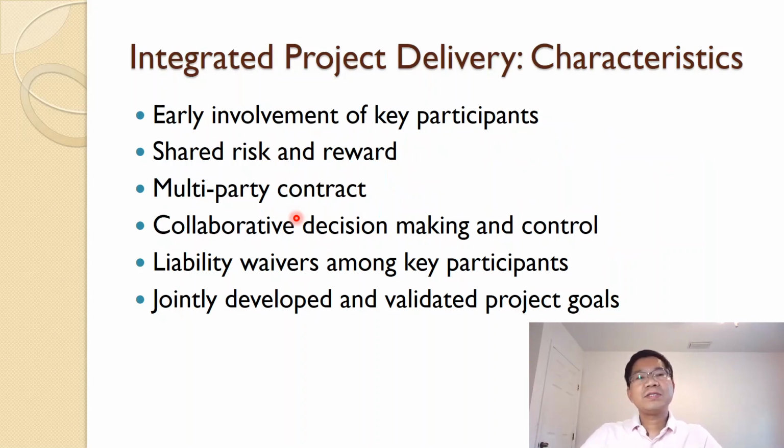So what are the characteristics here? Early involvement of key participants. The contractor will be involved during the design process, along with MEP, mechanical, electrical, and environmental engineer groups. If the project involves something like water treatment or wastewater treatment, they are involved in the early process. With early involvement, you can provide more expertise to make sure the project is done right the first time. And shared risk and reward.